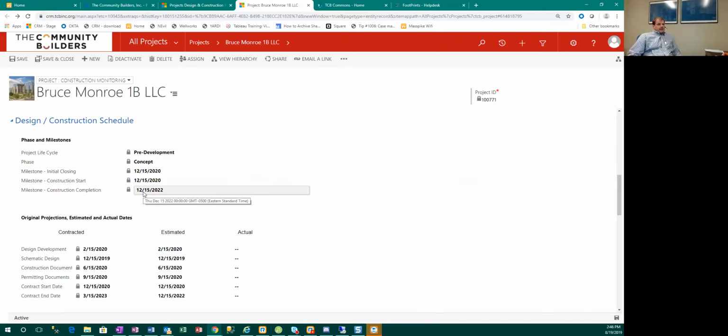Yeah, and I guess that's what I was getting at, is that if you update your contract end date, right, and you say, hey, by contract, this is now March 15th, somebody needs to have a discussion with the project manager and say, you're going to miss this milestone. And they either need to update that milestone or put a note by it, and the same with us, right? We've got to be able to explain to our partners why we think we're going to have this lapse between what our milestone date was and our actual.